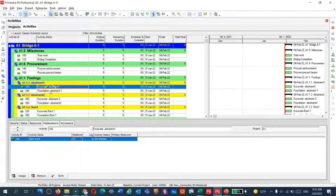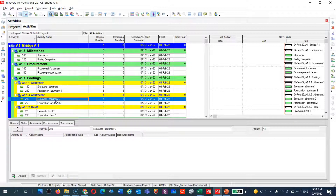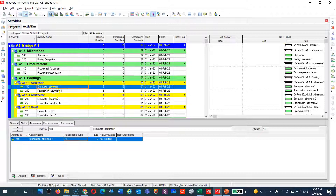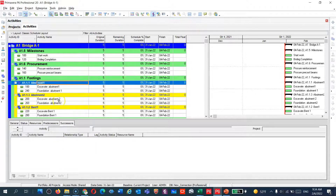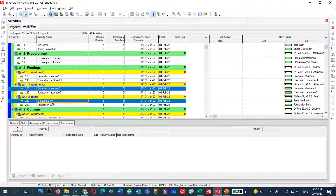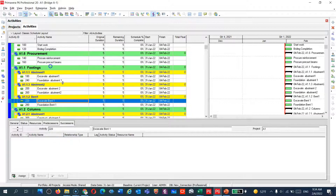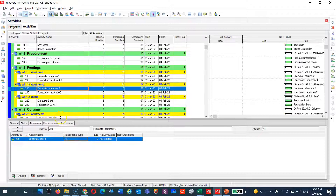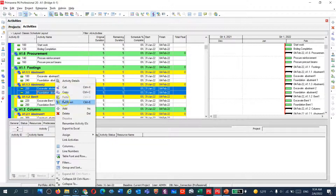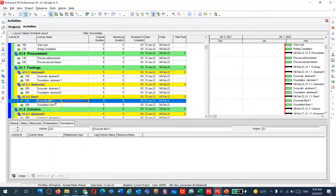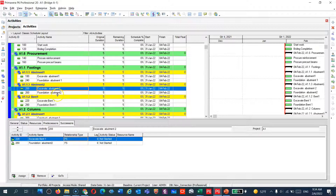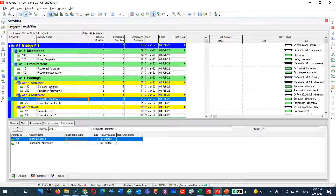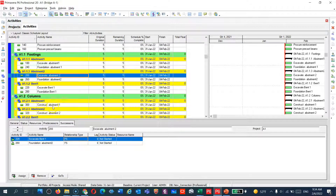You can see that after excavation of abutment one, the footing is now linked to start. For abutment two excavation, if I have one machine I start with abutment one and then move to abutment two — here's the link. After finishing excavation for abutment two, I can start excavating for bent one. Once you do the excavations, you can start doing the footing. Highlight them together, and once excavation finishes you can start the foundation. It's very easy.